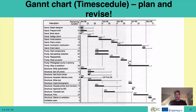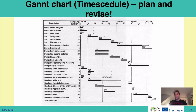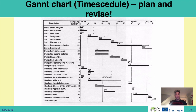This is a Gantt chart, which is just an idea. The point here is not to make the Gantt chart from the beginning, but to actually plan and revise it all the time. You set up different milestones, and if for various reasons you didn't make a milestone, you can decide what to do: reduce the project scope, work harder, or determine the deviation is small enough that you'll catch up. Or you might have buffer time — if you allocated two weeks of buffer and you're only two days behind halfway through, that's manageable. The important thing is that when deviating from your original time plan, you make a decision about what to do and create a new plan that you believe in.